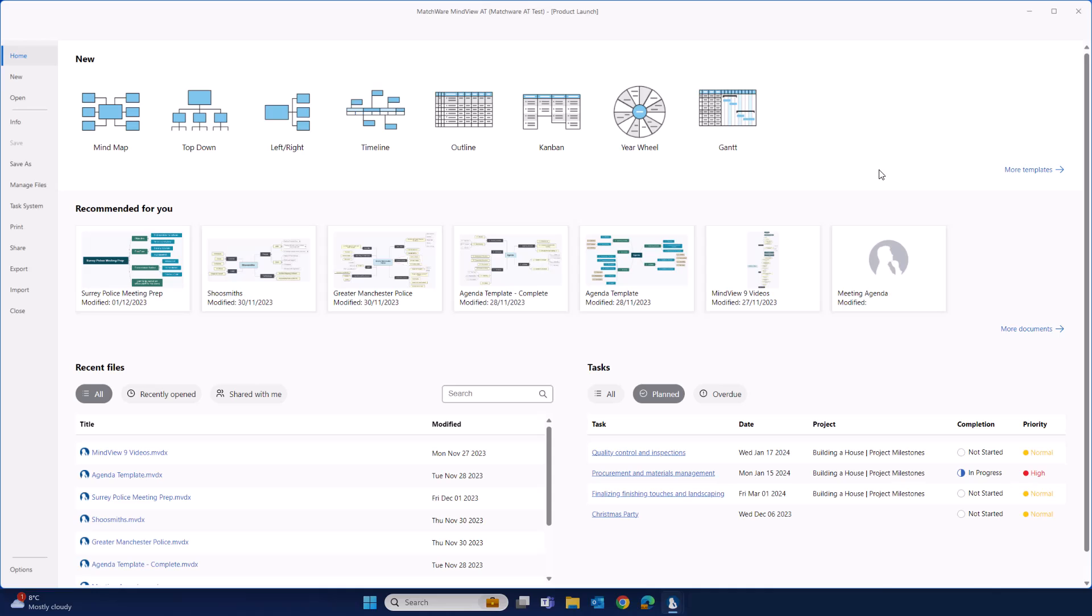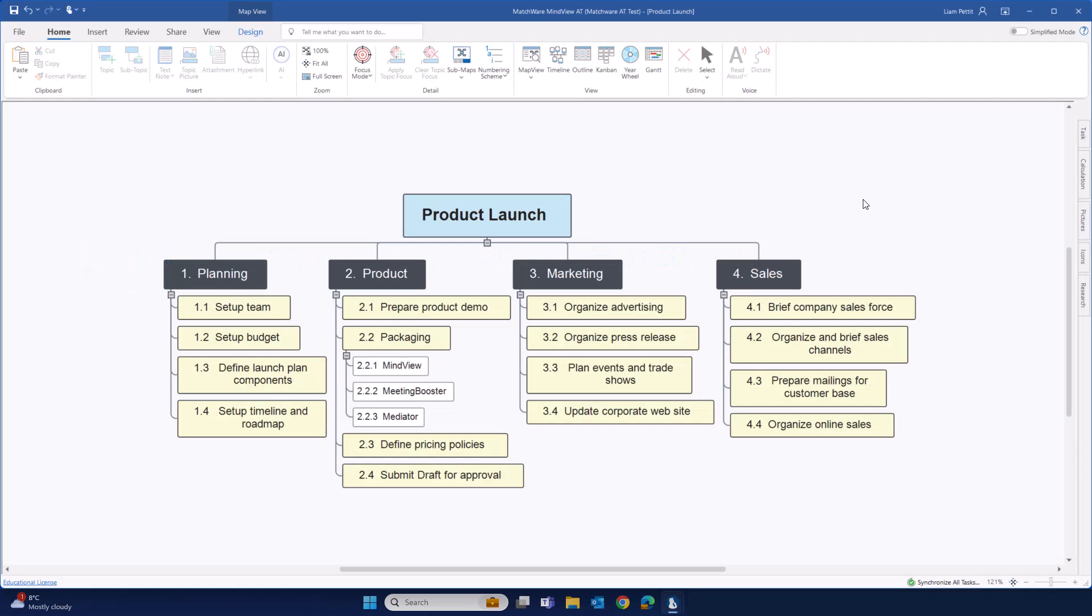We'll explore how to create a project schedule both from the work breakdown structure and from the project Gantt. Here in this outline, I've already created the work breakdown structure. The beauty of scheduling your project from the WBS is that the hierarchy of the WBS will directly relate to the structure and outline of your schedule.